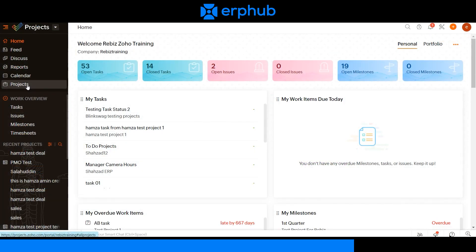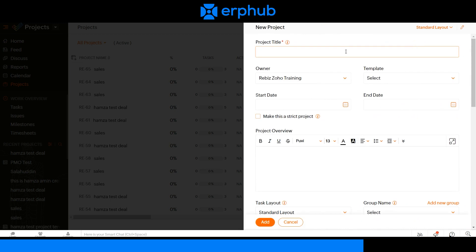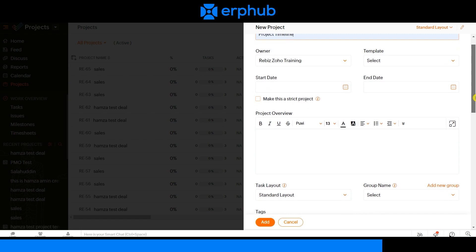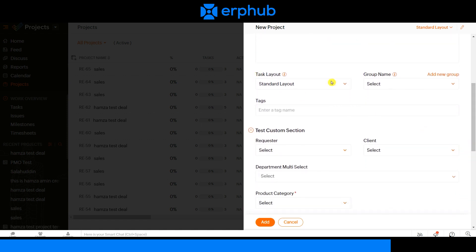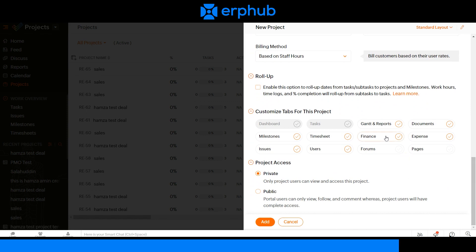To create a new project, click on the projects tab on the left side and click on new project. Start off by creating a project title. The owner of the project is responsible for managing this particular project. The template is where you can view pre-configured templates. The start date and end date indicate when the project begins and when it is due. You can add details and a description on the project overview section, customize the task layout and group name, customize tabs by checking the ones you want selected, and give access to this project as private or public. Once you're done, click add to create the project.